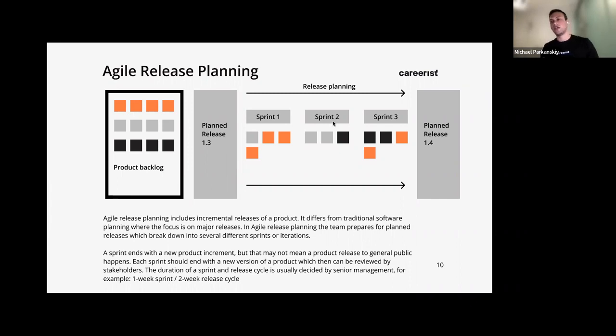So next week you come back and you plan the next 2 weeks, and in sprint 3 you start fixing these bugs. You verify, make sure they work, and at the end of sprint 3, or basically week 6, you sit down, you have a conversation, and you figure out, okay, we got a chance to build everything we wanted to build, and we fixed all of the bugs we wanted to fix, and let's do a release. And the new release for Instagram is planned release 1.4, and now the customers are able to take pictures on Instagram. Essentially, that's the idea.